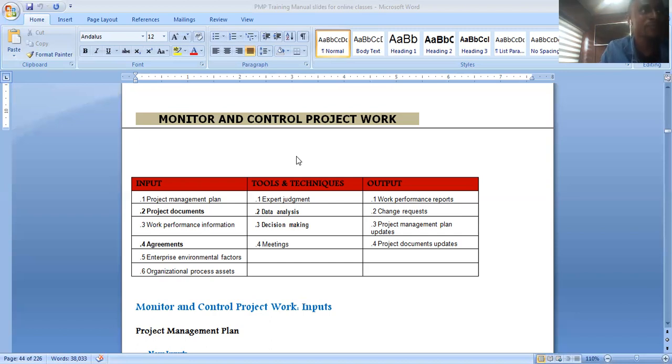Materials. Beautiful. So for that single 1 hour you took in that critical activity, you have cost us $50,000. The man will be sure. Oh God. You gotta say it cost us $50,000. You now take the book and start showing him, because we are going back to do this. We are buying 50 bags of cement, so and so length of rivers. We have to pay for the batching plant for an additional 1 day. See it? Because of this, because of that, and the guy will now understand the importance of time.